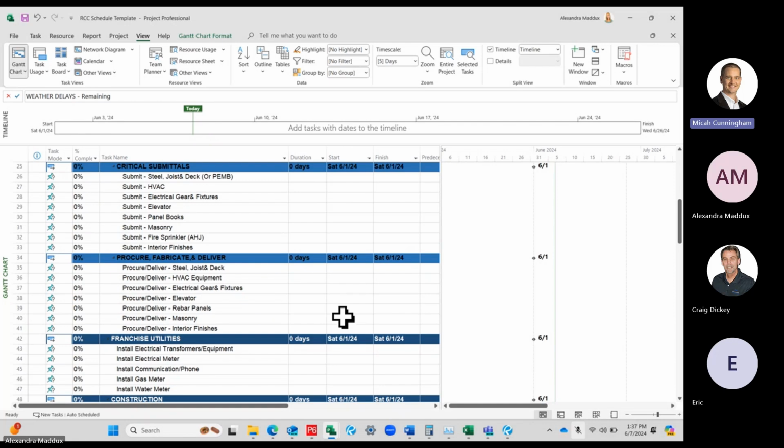So basically, whatever your contract says for specifications will usually be the most strict to follow, but then anything that you have internally that is a guideline you follow, you'll do that as well. That would be saying like only 1 trade per activity, or a maximum duration, or maybe a minimum duration. I've seen minimum durations as well so that people don't break out every electrical panel or something like that. I've seen a lot of 1-day activities that really just don't need to be broken out individually. So those are scheduling standards that you might encounter or hear about.